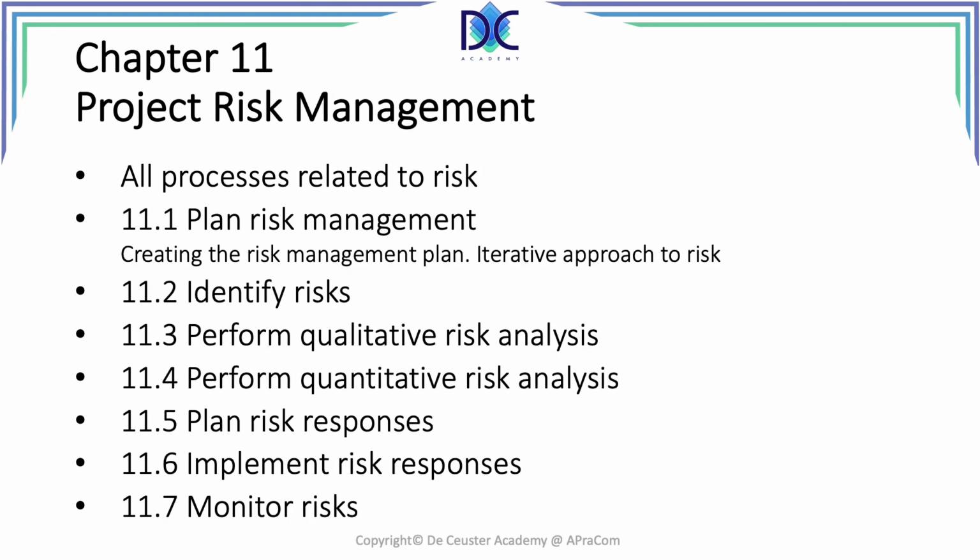Well, risk management, we have to manage a risk. We will be looking into that in detail. It's very clear. This is one of the last steps in planning when we look at the 10-step process, because we can look at the risk at the end when we know everything about a project. Now, every step we're doing, we always have these other steps in mind. And while we're going through the project, while we're looking at the requirements, at the scope, at the scheduling, we will also identify the elements that may lead to risks. And at the end, we will bring them together, we will evaluate, and we may go back through the cycle to start these things again.